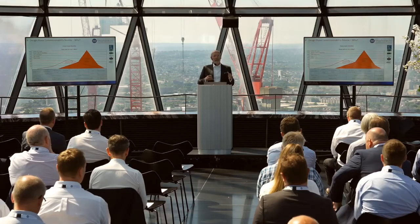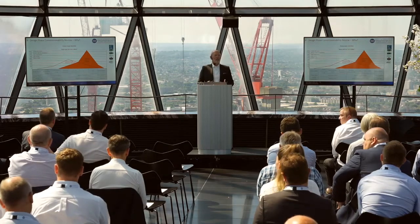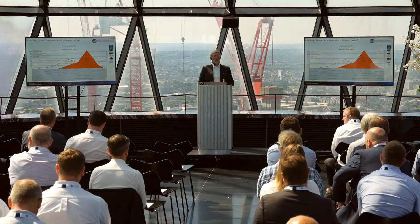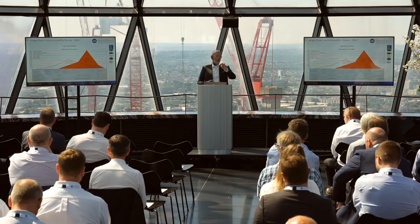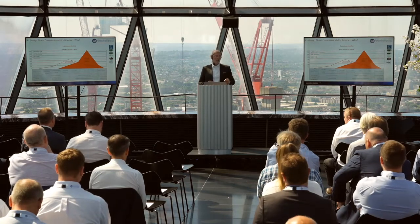Now, the commissionability review, we're going to spend a few slides on this. Why are we doing this? If you can intervene during design and manage quality into that job, you can do that for no money, right? So what I mean by that, if you do a drawing review and you see a problem and you can fix it on a CAD drawing, that takes no money, right?